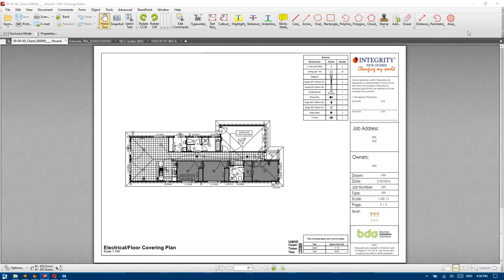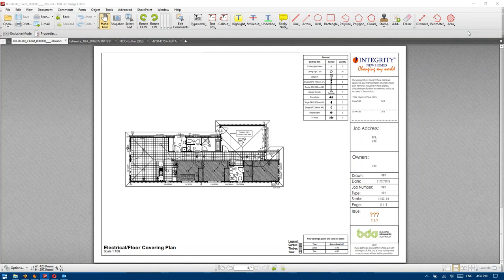In terms of our general standard specification, there's a reference to downpipes in there. So when we're selling to people, we're selling on a standard specification. I'm wondering if we need to have a look at the gutter component though and double check the dimensions associated with that. I'm reasonably convinced the specification doesn't talk about 115 or 125 quad gutter — our jobs have been priced on that. They haven't been priced on 150mm whopping engineered gutters, which the engineer when he sees it may come back and say unless you put six extra downpipes in, that's what you're going to have to do.